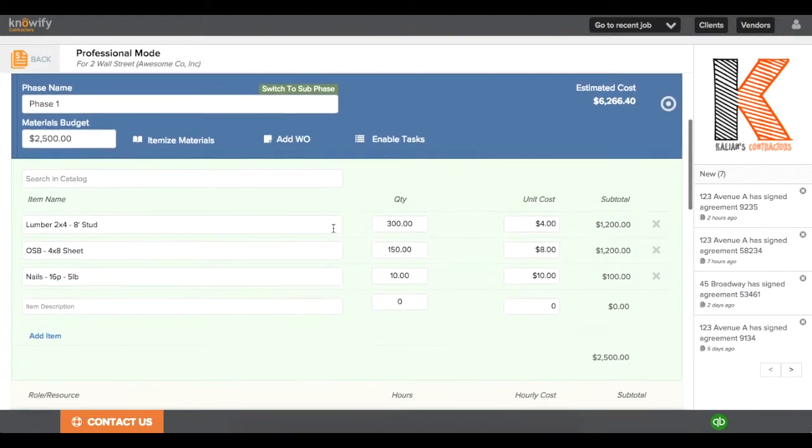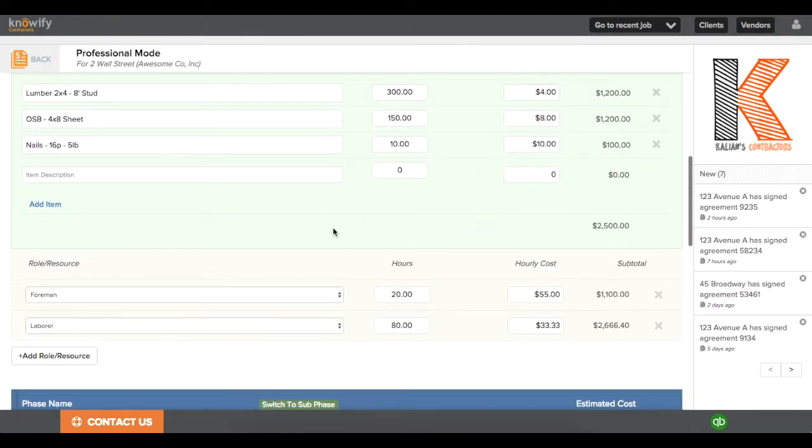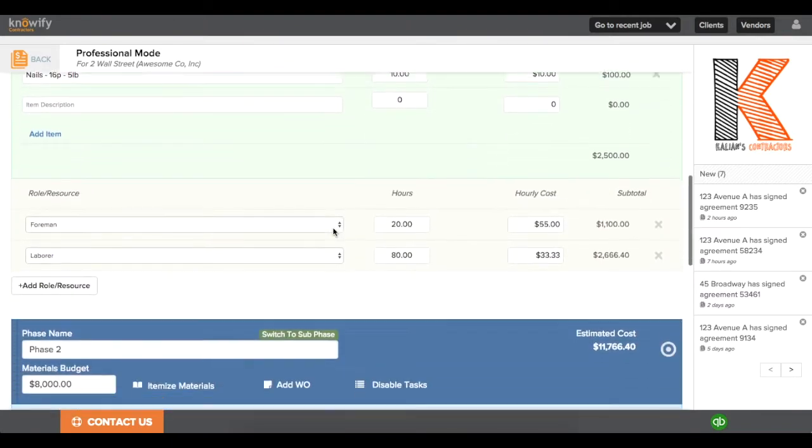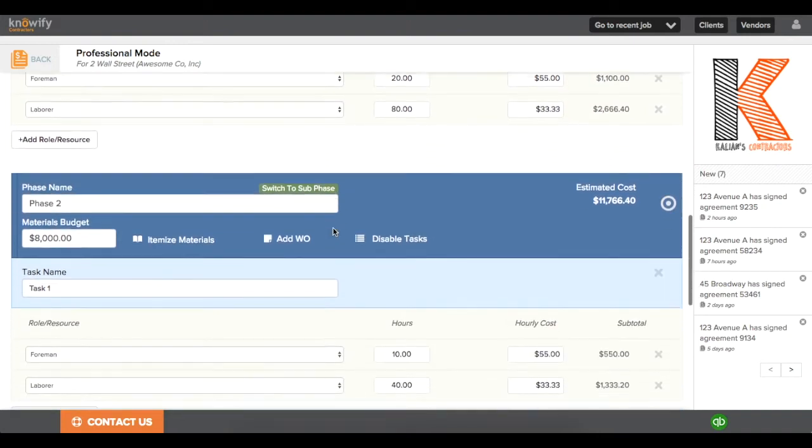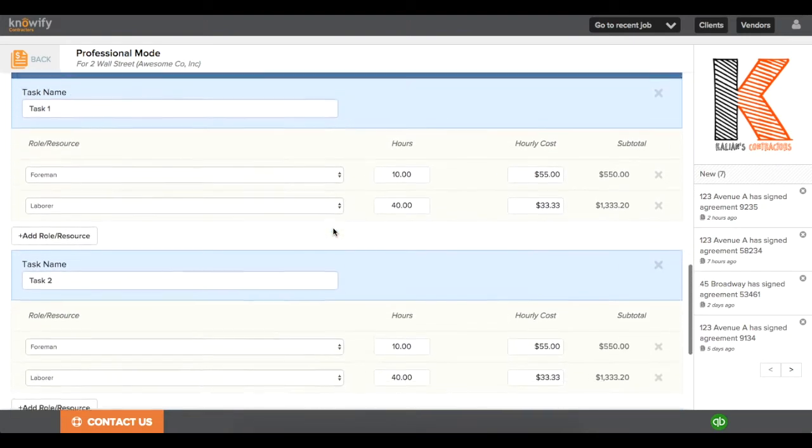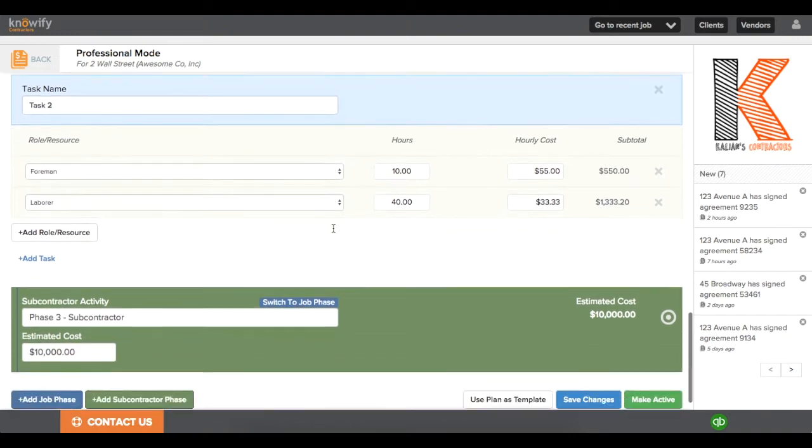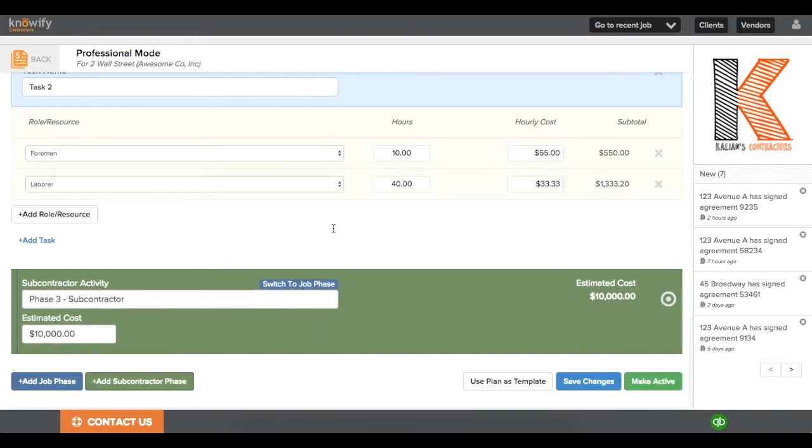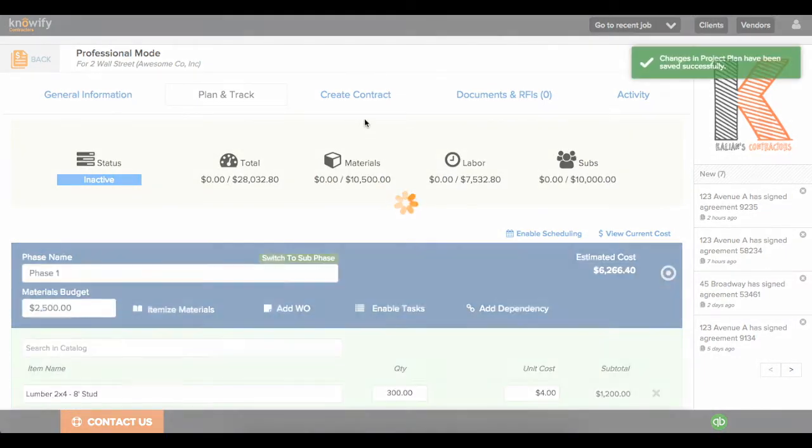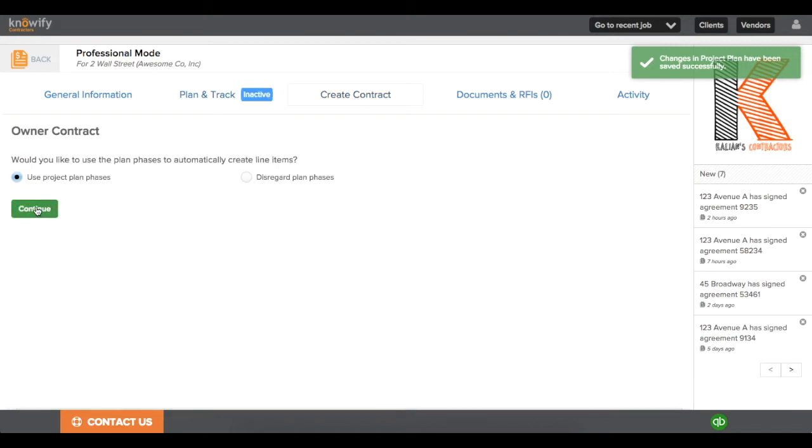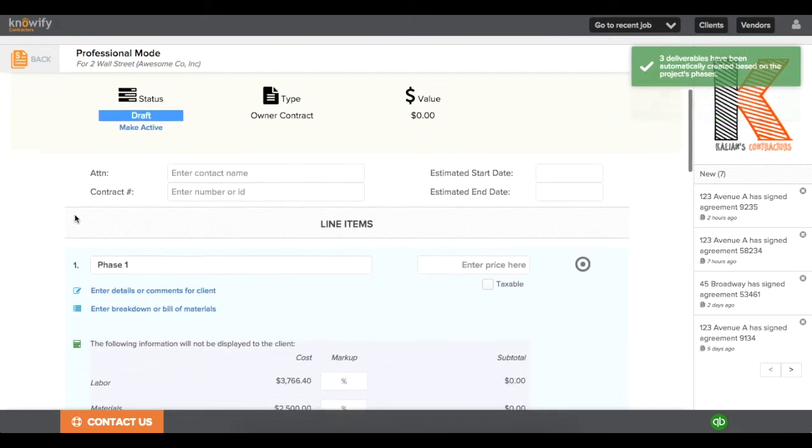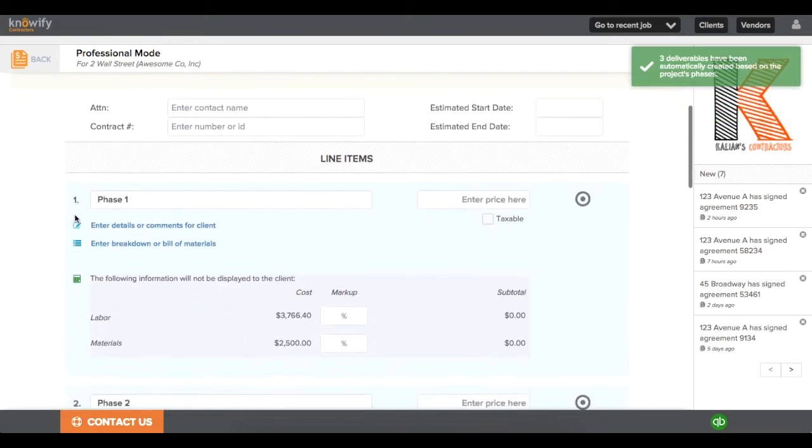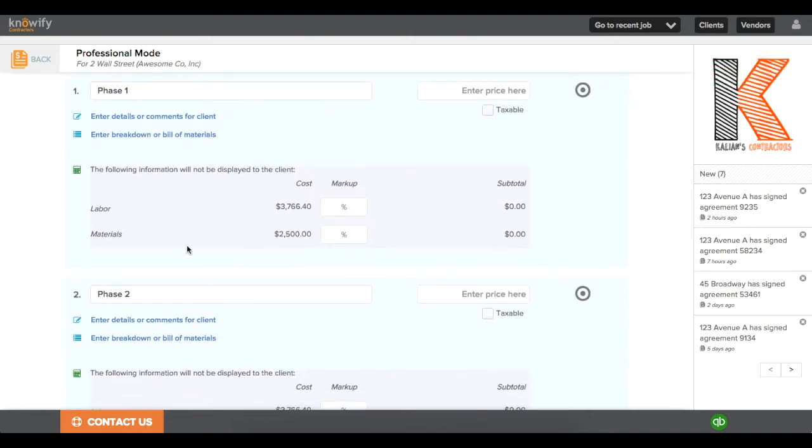I loaded in a template of a job here just to save some time. You'll see that I have it broken down into all of my different phases here, and all of these phases have an estimated material and labor cost associated with them. This way, when I'm creating the contract, we'll use the project plan phases, and it'll automatically create a line item for each phase that was in my Plan and Track section.